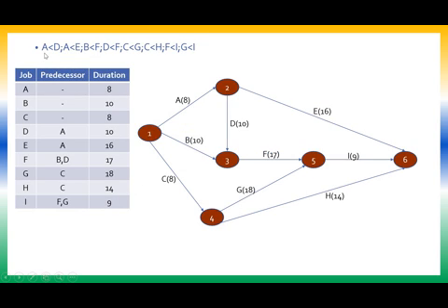and then I will write the predecessors using the statements. A < D, so A is the predecessor of D. A < E, so A is the predecessor of E. Then B < F, so B is the predecessor of F. D < F, so D is also a predecessor of F. Then C < G, C is the predecessor of G. C < H, so C is the predecessor of H. F < I and G < I, so F and G are the predecessors for I. Right? So the jobs A to I are written,